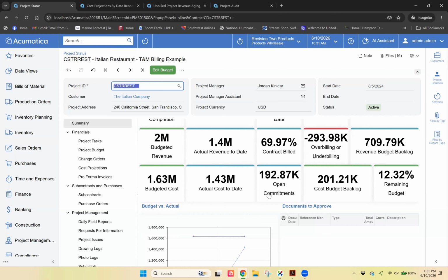So what this is telling me is that we're staying within reason of what we expected to spend. Our issue here is we aren't getting the revenue that we're expecting. So we need to focus on that. And this is giving you that visibility right here, one versus the other. Obviously we have some POs still coming in, but overall, this is where we need to focus, getting these numbers and these metrics.